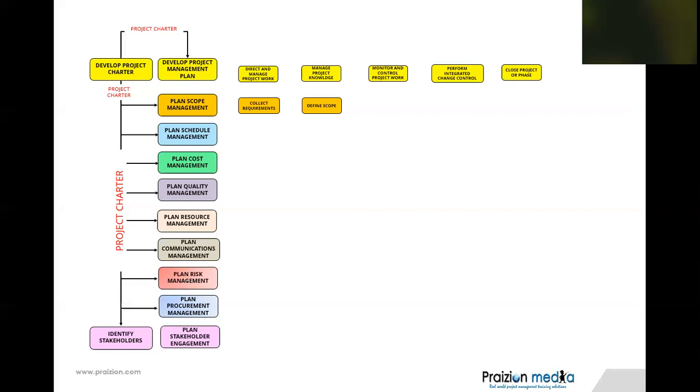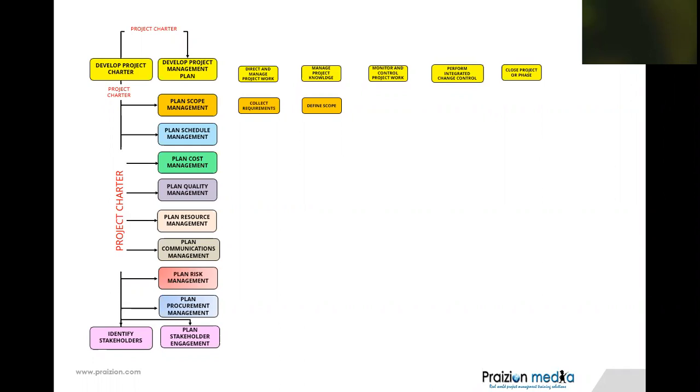So, the Project Charter goes to all of these places, all of these planning components. Just think about it. It'll stick. Plan X Management, you see the Project Charter going into all of those. That's the first part of what I wanted to show you. But now, I want to show you how these processes, these processes of integration management, because I talk about how important integration is, I want to show you how all these processes of integration management are daisy-chained, as it were.